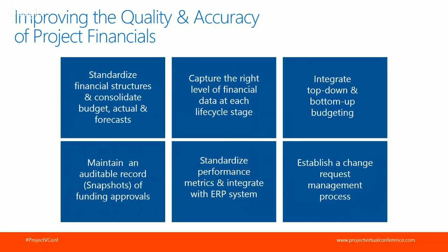Well, first and foremost, we want to look to standardize financial structures within the Microsoft PPM platform. We then want to move away from tools like Excel and really make financial information a first-class citizen within your Microsoft PPM platform. The ability to deal with what I call financial amplification, which is a simple acknowledgement of the fact that the deeper you get into a project's life cycle, the more and more financial information is going to be required. So to go from yearly assessments in the early case business case to monthly assessments in a detailed business case is key, because we want to evolve the financial estimates as well as schedule and resource estimates for a project.